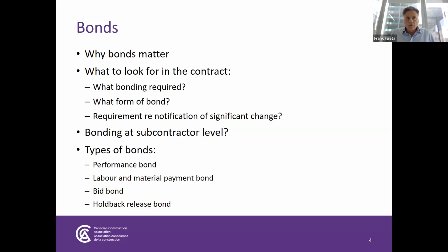So the contract security requirements, as Glenn mentioned very quickly, used to be together with the insurance requirements, and then CCDC has split them off, and they can now be found in Division 00. I think that's correct, right, Geza? Division 00 of the specifications, and it's a fairly in-depth description of what security is required for the contract.